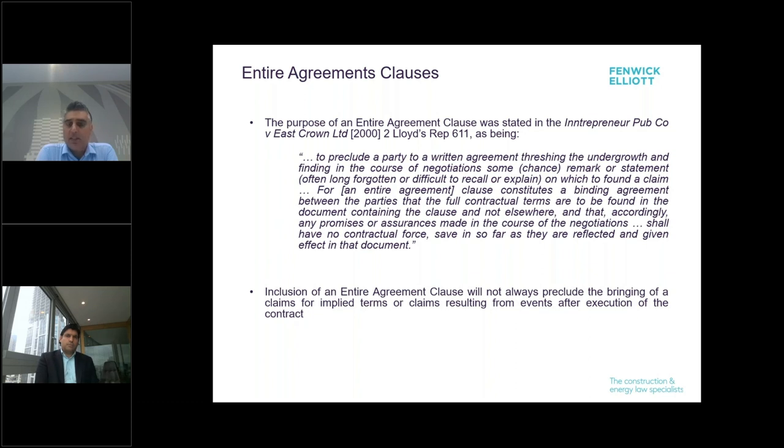A claim for rectification on the basis that the contract does not set out the terms as agreed between the parties is also not affected. And it will not necessarily affect the implying of terms into a contract, unless the entire agreement clause specifically excludes the implied terms. And again, implied terms is something I will look at very, very shortly.